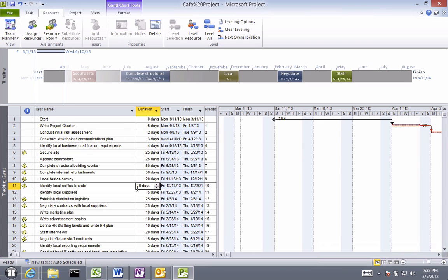Updated automatically. Why? The boss will go, how come it's going to take that long? Well, the only resource he gave me is Doug, right? He's going to go on vacation. Either you tell Doug not to go on vacation or give me another person. You tell me what's important. Is time the most important thing? Then give me another resource. Or is budget the most important thing, that we have to use Doug? Then sorry, time will slip.